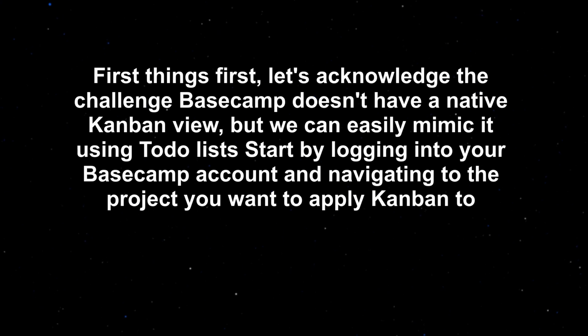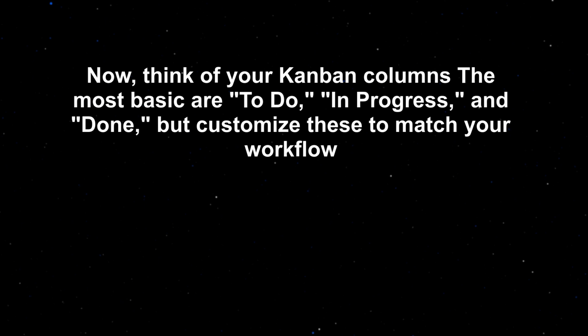Start by logging into your Basecamp account and navigating to the project you want to apply Kanban to. Now, think of your Kanban columns. The most basic are to do, in progress, and done. But customize these to match your workflow.